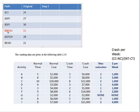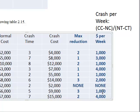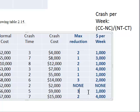You've got BDFGH as the critical path. You have to find which activity on it costs the least to crash per week. B is $3,000, D is $4,000, F is $2,000 per week, G is none, and H is $1,000 per week. So you're going to crash H, and it says you can crash it for three weeks.